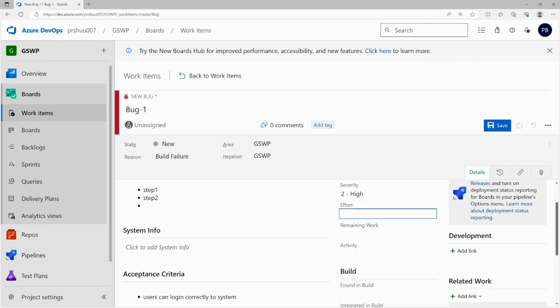How much effort is required? So we can give user story points to this bug, 1 point, 2 points, however many points are required to work on it. So what is the complexity? For example, I want to give 8 story points, so it's complex enough to give it 8. It's a team decision to define the complexities, what 1 complexity is, what 2 complexity is, what 3 complexity is. Those are the team's decision, and these are mostly in the order of 1, 2, 3, 5, 8 and so on and so forth.